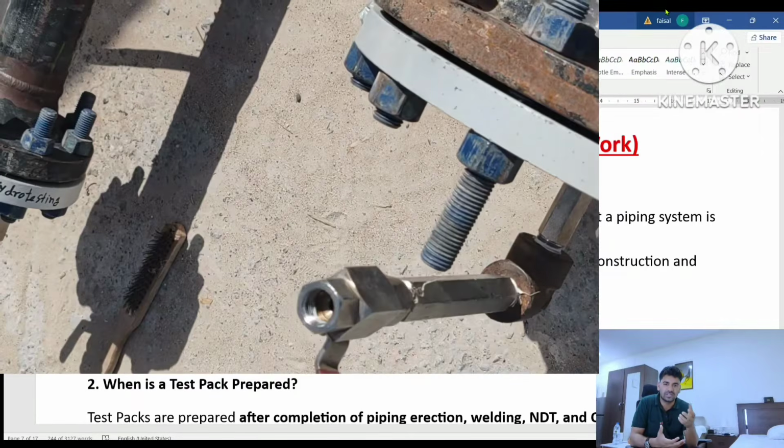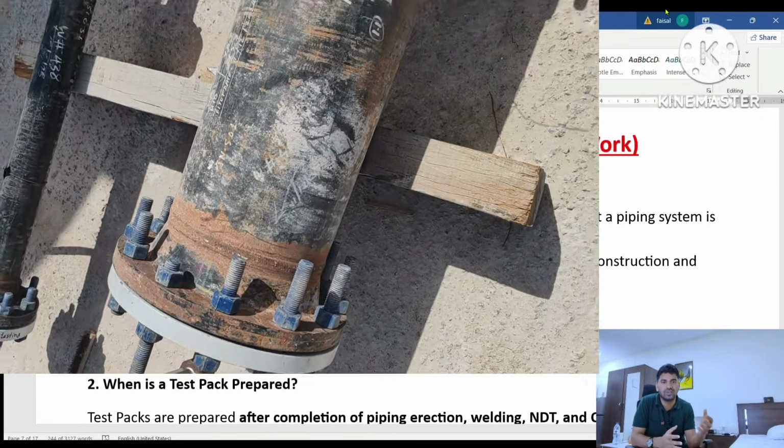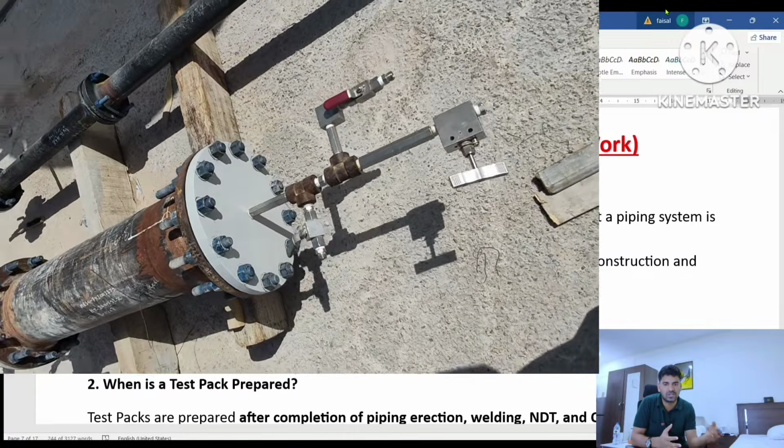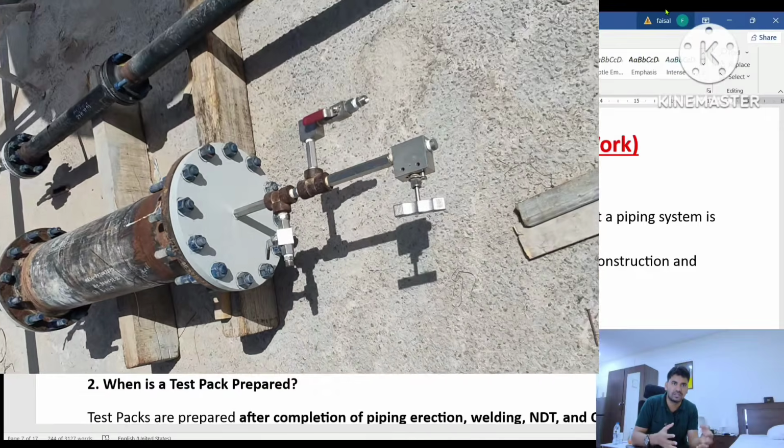That is called the test pack. It acts as a final verification package before mechanical completion and handover to the pre-commissioning and commissioning teams.